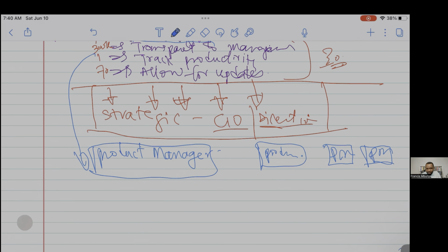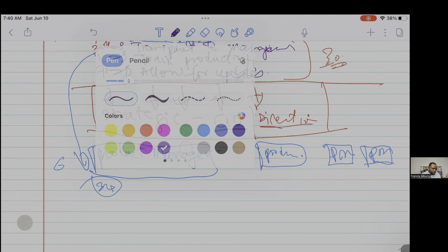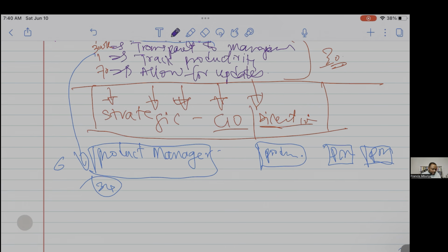Now, we're still talking on release planning. Now, if you understand this flow, then you understand why release planning is important. Now, the manager comes in here and says, okay, if we need to deliver this within the next 6 months, for my team, I'm going to need a total capacity of about, let's say, 34 people. Now, if I'm needing a total capacity of 34 people, then I'm looking at something towards about 4 Scrum teams. It's averagely 7 to 10 people in a team, somewhere around here. So I need 4 Scrum teams to be able to complete this work.